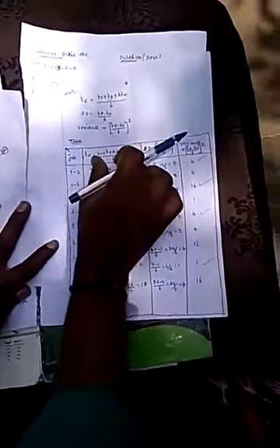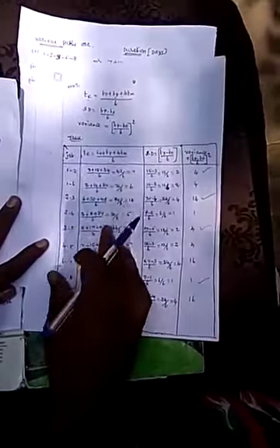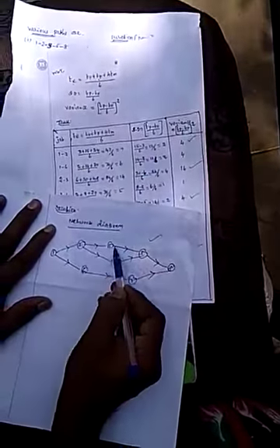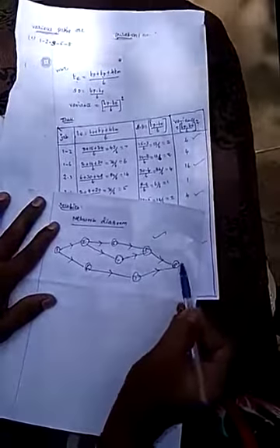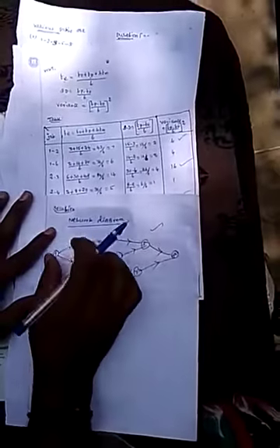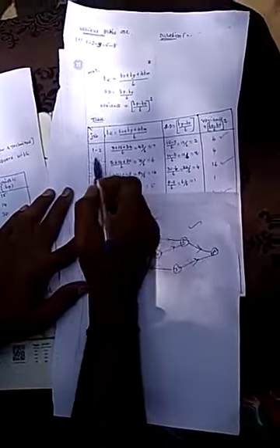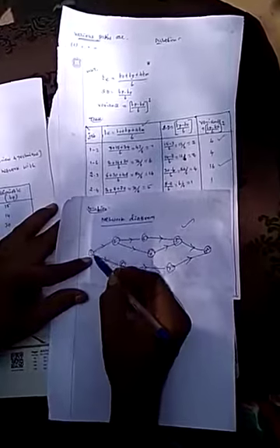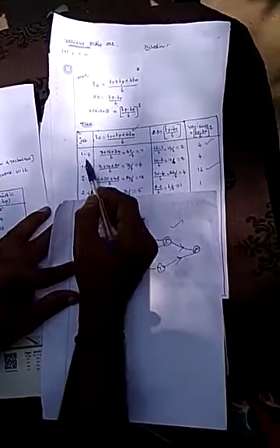So for the jobs given, use the TE formula, and put in the standard deviation and variance. So these are the jobs given. Now find TE, the expected duration. This expected duration value is to be found for 1 to 2, 2 to 3, up to 5 to 8 and the last job, 7 to 8. So for job 1 to 2, how many days to complete? Find the 1 to 2 expected duration using this formula. First take 1 to 2.